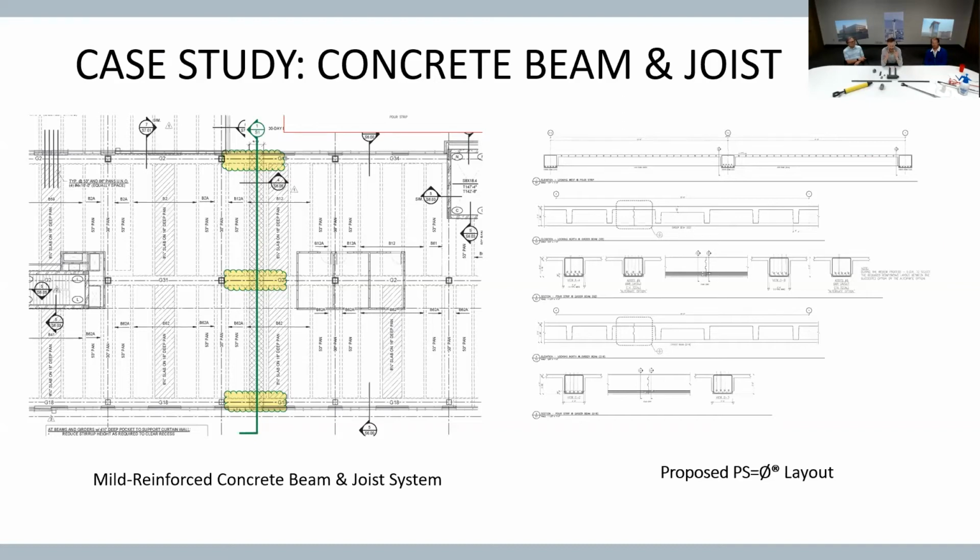We think that the general contractor and the owner have probably the biggest benefit of this, even though right now we're primarily selling to concrete suppliers. But selling it to an owner or a general contractor, where we actually see value in time and potential savings, like I just mentioned, on traffic coatings or other auxiliary pieces, your other trades getting in there early, that is just huge. And taking the pour strip off the critical path, gone. You guys don't have to worry about the pour strip being on the critical path.